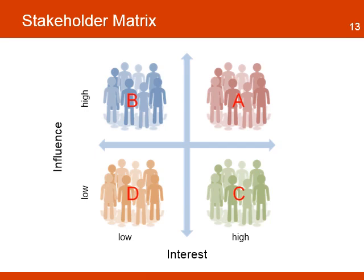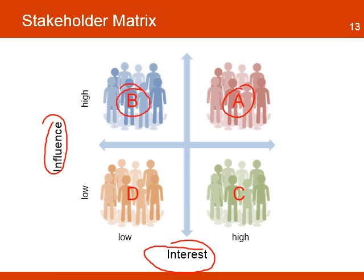A tool used to identify and classify stakeholders is the stakeholder matrix. The matrix identifies stakeholders based on their level of interest and their level of influence. A stakeholder with a high level of influence and a high level of interest will be in group A — for example, the project owner. A stakeholder with high levels of influence but low levels of interest will be in group B. A stakeholder with high interest but low influence will be in group C. Group D is for those stakeholders with low influence and low interest.